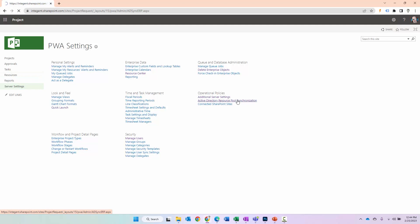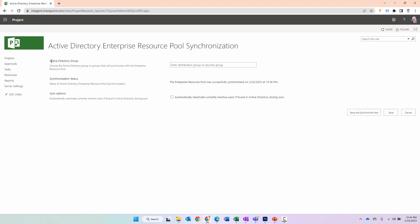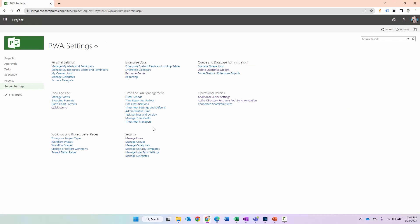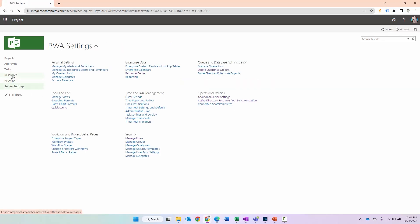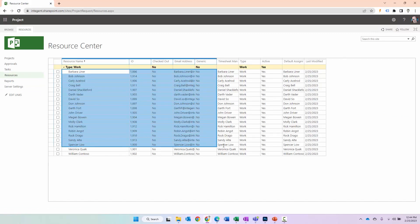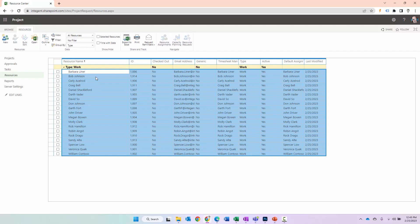I'm going to click on Active Directory Resource Pool Synchronization. Currently you can see there's a section for Active Directory group. I'm going to find a group called Resources and select that. This is going to synchronize the resources in that group — all the resources I want to be able to assign to tasks and projects. I click Save and Sync Now. The synchronization is taking place. If I go back in there, we'll note it was synchronized successfully at this day and time — today's the 25th. Click Cancel. So now if I go to my resources, I can see a handful of resources all added to the system.